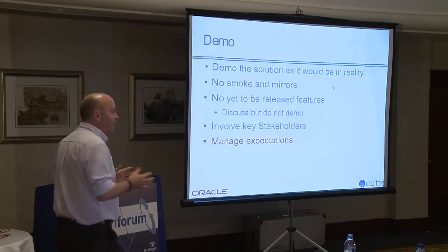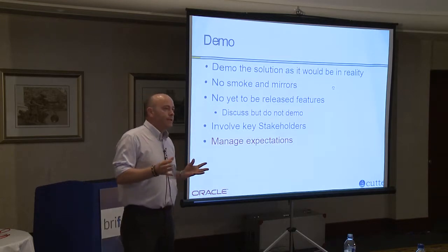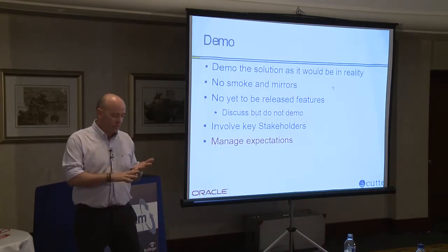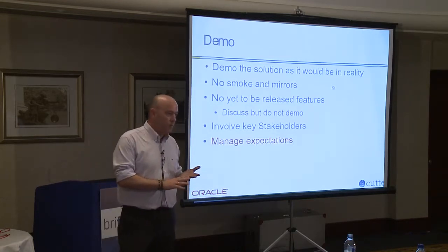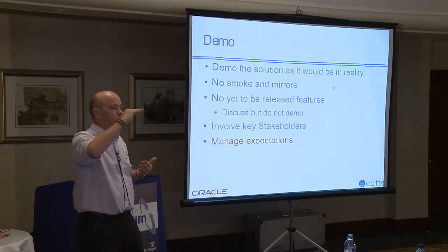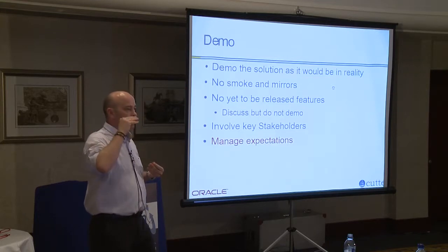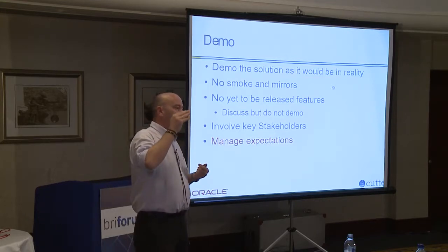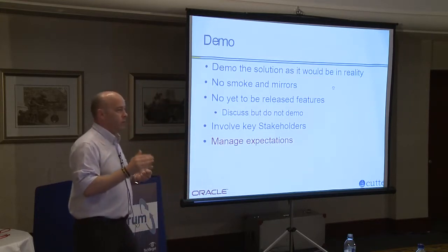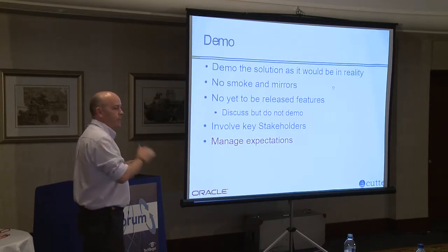Involve your key stakeholders. And where I say key stakeholders, it's not just IT departments, it's not just finance departments, it's everybody within the layered structure that is going to be affected by VDI who needs to be engaged. They need to understand the reasons behind what you're doing, they need to understand the implications of what you're doing, and they have to have their expectation management.